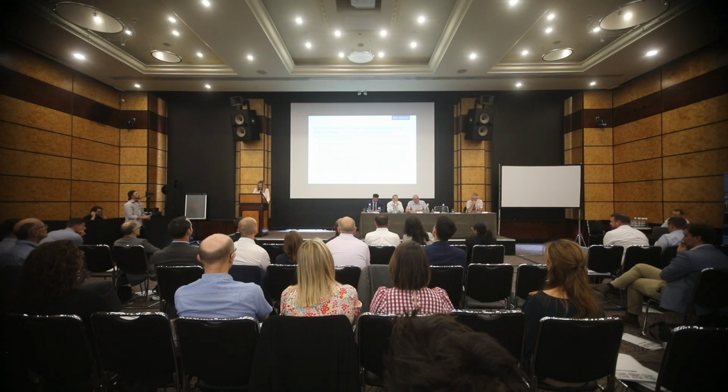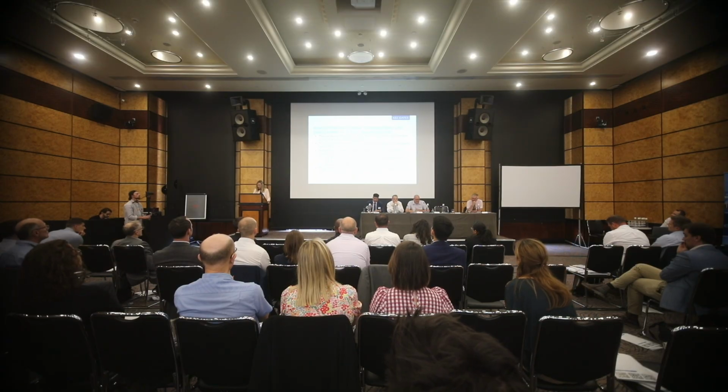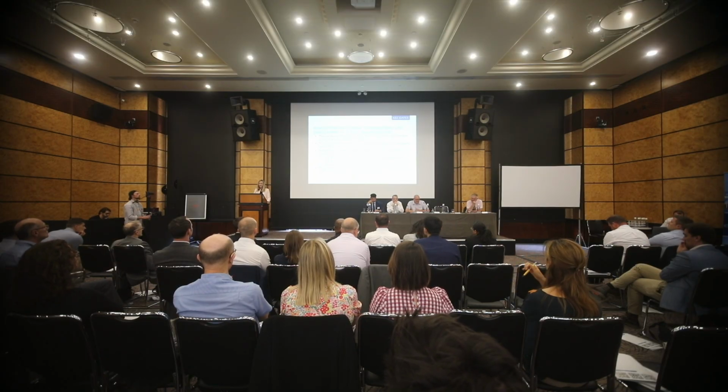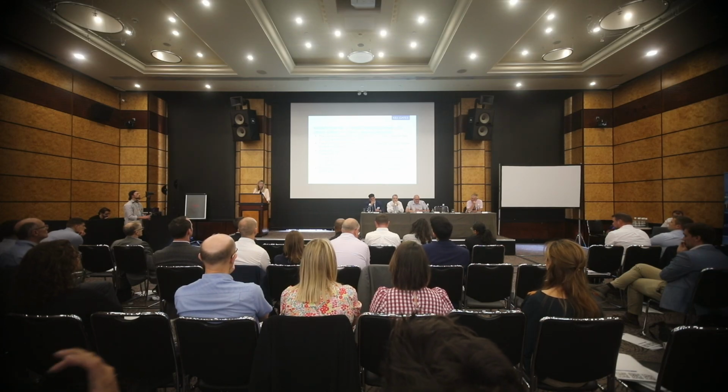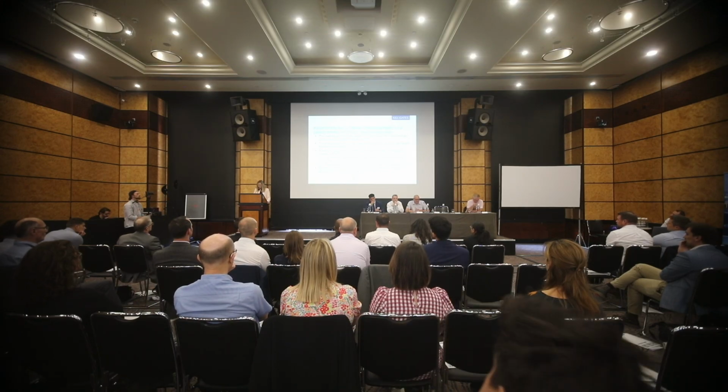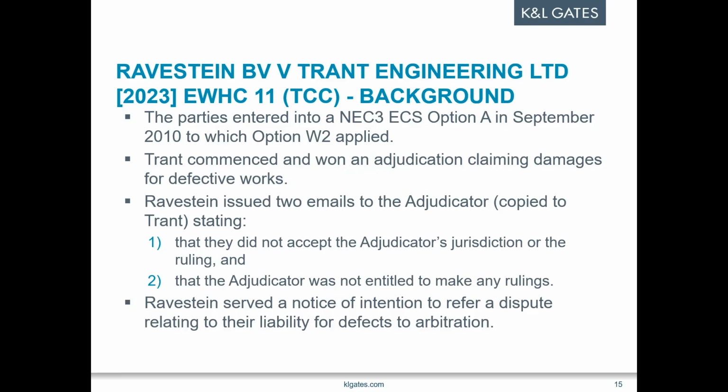So in the very recent case of Ravenstein and Trans Engineering, Ravenstein are a Dutch shipyard and construction company. They entered into an NEC4 engineering and construction subcontract. Option W2 applied, the provisions of which, as we know, state that an adjudicated decision would be final and binding unless a notice of dissatisfaction was provided by one of the parties within 4 weeks of the decision.